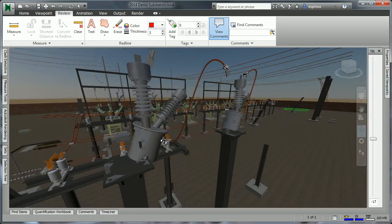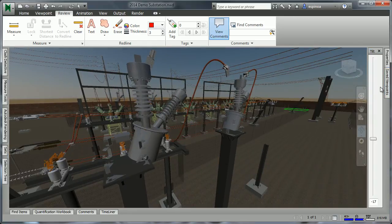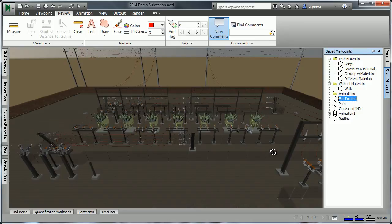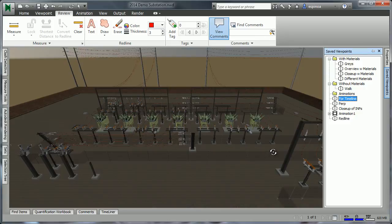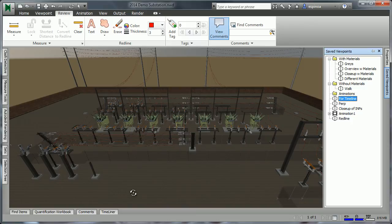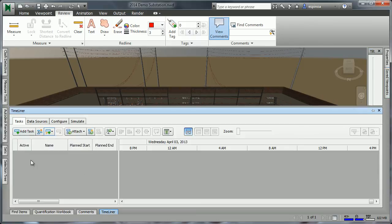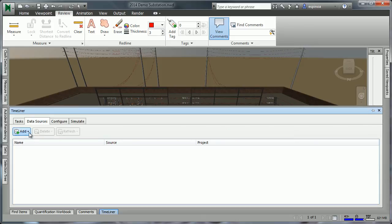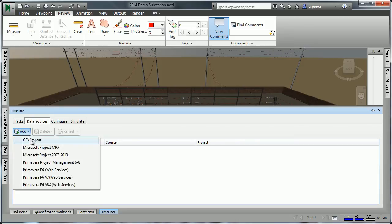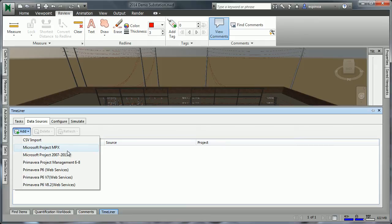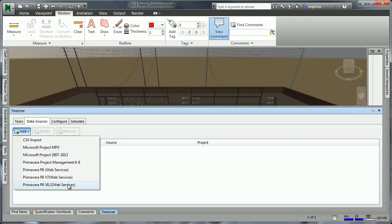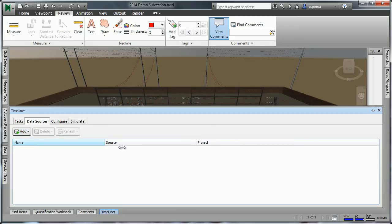One of the very important capabilities is the ability to create and use a timeline for construction sequencing. Within the Timeliner, we can set up a series of tasks, which are linked to the objects. These objects can also be linked to a calendar. There are various ways to configure this. Under the data sources, we can see that we can add in either comma-delimited files, Microsoft Project Information, Primavera of various file versions, and all be brought in to create the tasks.